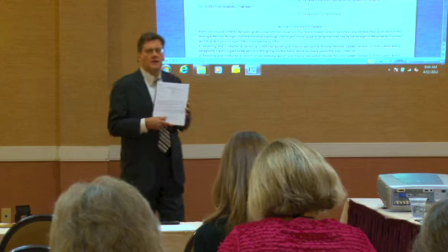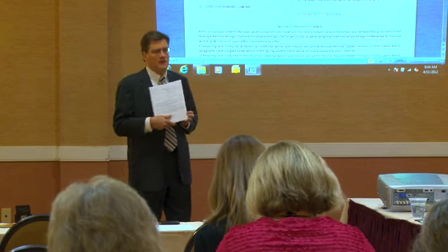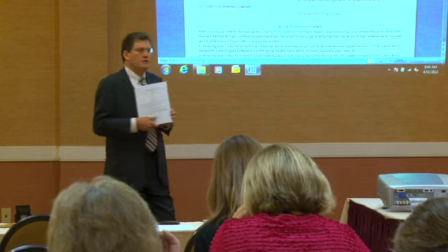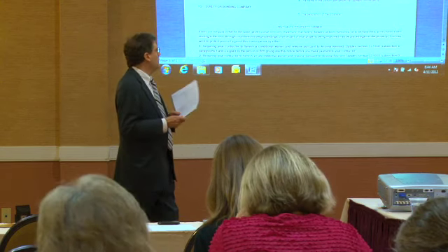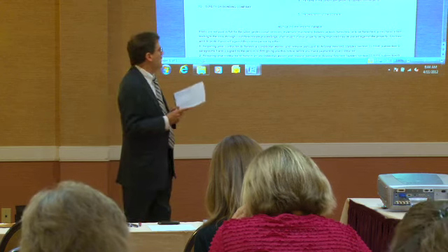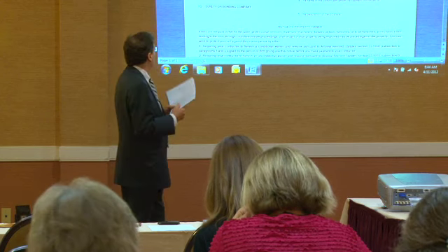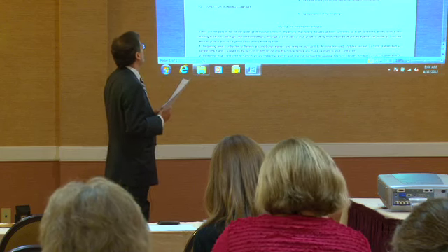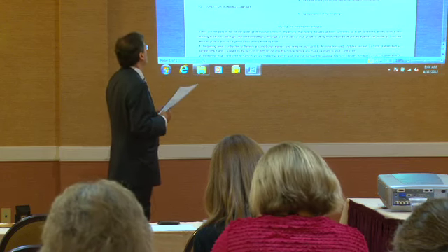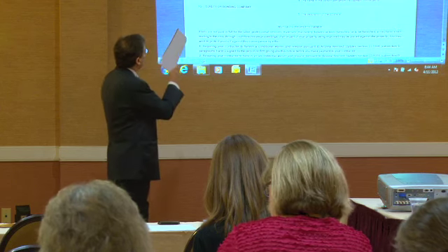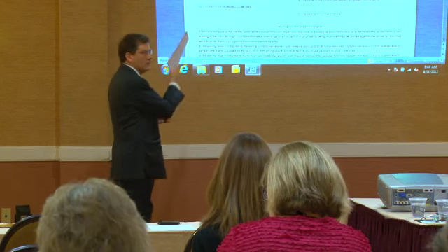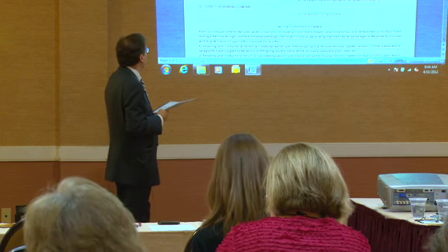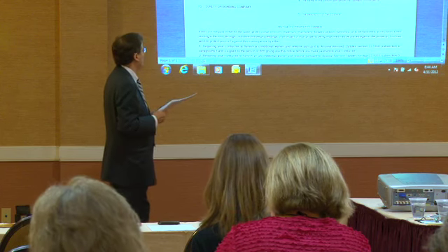Again, this is a document if you want to secure your lien rights or your payment bond rights in all but federal bond situations. You want to put a 20-day notice in the mail, and you're required to do so, identifying who, as you can see on the upper left side, the owner or reputed owner, the original contractor or reputed original contractor, and by the way, you also want to have the current contractor if different from the original, the lender, and the surety or bonding company.